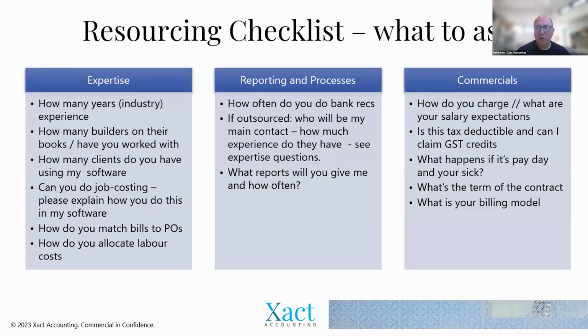Abby, what software are you using for job management? We're based in New Zealand and we use Builder Price. Right, okay. And we run through Xero. So we filter all of our bills through that and things like that. So wherever we can, we do try and recommend a lot of that job costing happening in the actual job management software. Yeah, because you should really be seeing your estimate and your actuals next to each other per item, and seeing where things are going off track, or where you're doing well. We also have a real old school spreadsheet that tracks the original estimate against every invoice that comes in and how we're then offsetting at the end, which is purpose built, but it works. But it's just trying to get them all aligned and essentially automate it where possible.